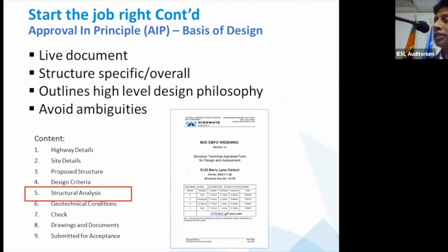Then it's set, and it's good for your claim purposes as well if you are wearing a different hat, because it's been agreed. Any changes feed into change control, and that prompts a claim. Thankfully we implemented that for our project, and there are a number of AIPs. I'm so proud of that. I managed to introduce many in this Central Expressway one.